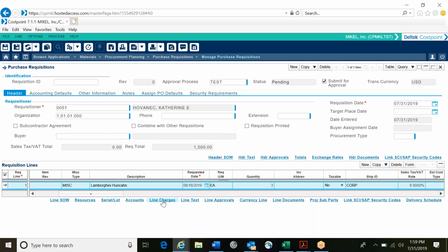So in other words, what we're saying is that when we order, say we're going to Lamborghini of Norwood, we're going to order a car, and the shipping and handling is $250 and the insurance is another $100, so that's $350, plus tax. That has to be included in the total price on the PO, which means all of that has to be included in the total price of the rec, in the one item that says purchase price.